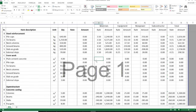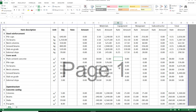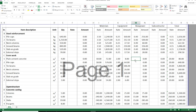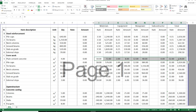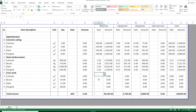Then let's go to the formwork. For materials this includes the wood, plywood, box sections, and scaffolding — let me put 18 here. For equipment, some hand tools, so let's add 2 dirhams. For manpower, let me calculate — 12 dirhams. The total rate I'm getting as cost for formwork is 32. I can copy that and price the formwork for the superstructure as well.